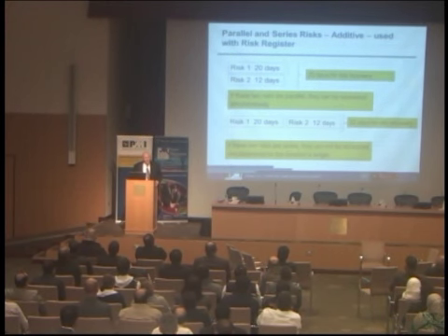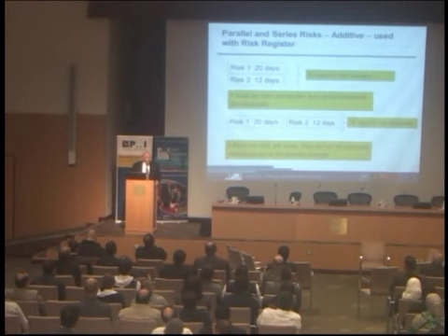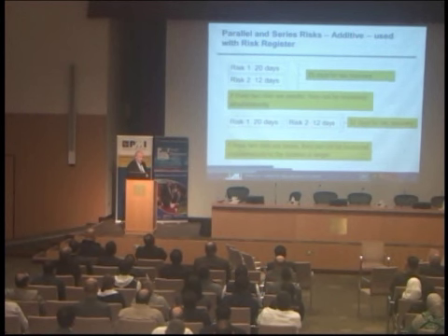You want to ask yourself, is recovering from one of those risks crucial and must finish first, and then you can recover from the other risk? Or are you recovering from one of the risks taking all the resources available and you can't recover from two risks simultaneously? And pretty soon you have yourself convinced that you either have to do them in series or you can do them in parallel.